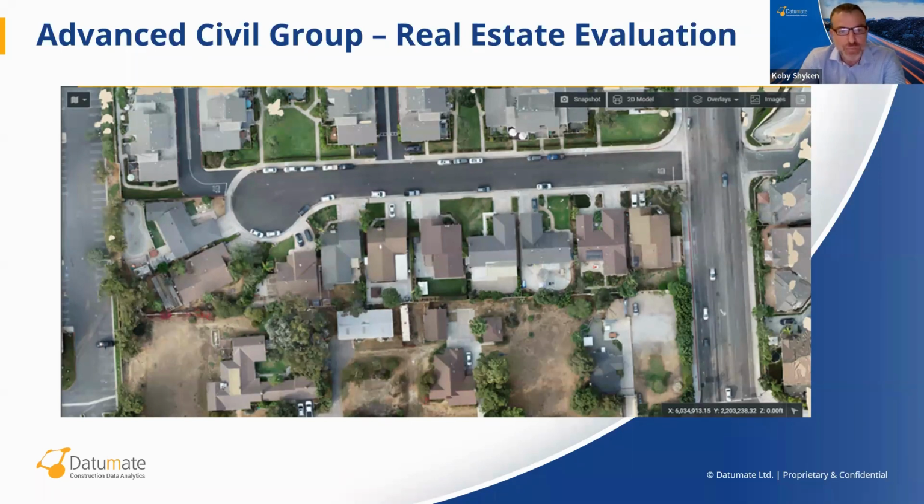And he says, one of our biggest challenges is always access to adjacent properties for elevation data. In this situation, while ACG had access to the property that was being surveyed, there were 9 separate landowners that abutted the Huntington Beach property. It was critical to understand each one's elevations in order to present accurate data and recommendations. So Steve is able to leverage his drone program to deliver site data in hours rather than days.